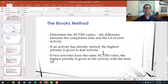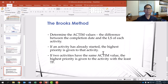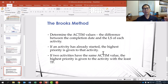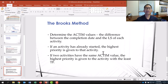First, determine the active values — the difference between the completion date and the late start of each activity. If an activity has already started, the highest priority is given to that activity, so it tries not to be interrupted. If two activities have the same active value, the highest priority is given to the activity with the least total float, meaning it is near critical and less flexible.